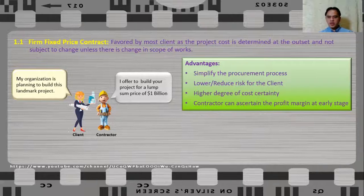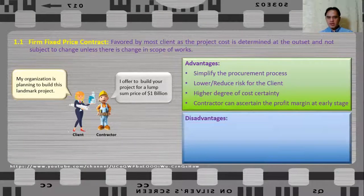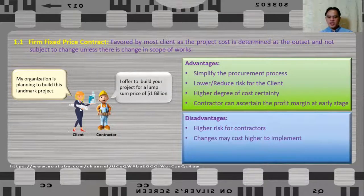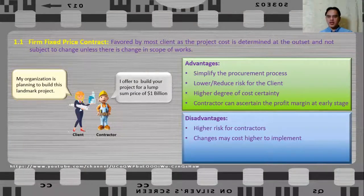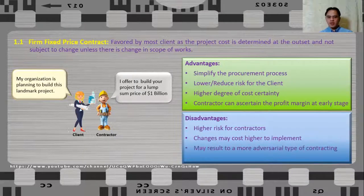Firm fixed price contract also has the following disadvantages. There is a higher risk for contractors and changes may cost more to implement, because in a firm fixed price contract there may be no price breakdown. So any variations that the client wishes to implement may be priced higher by the contractor, which may result in a more adversarial type of contracting and is prone to dispute.